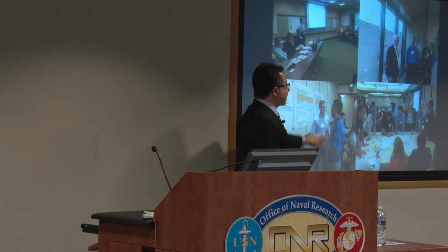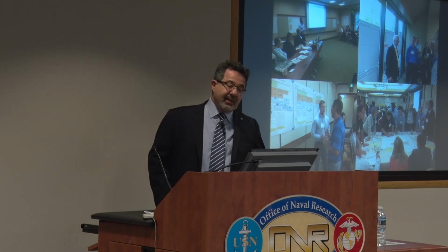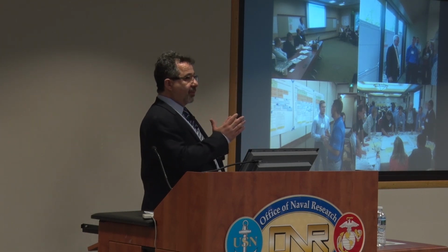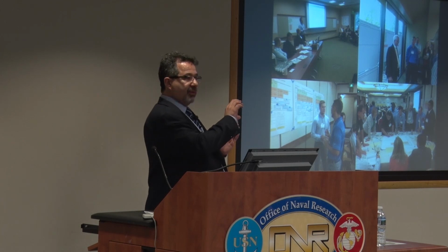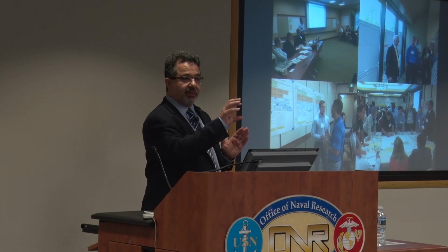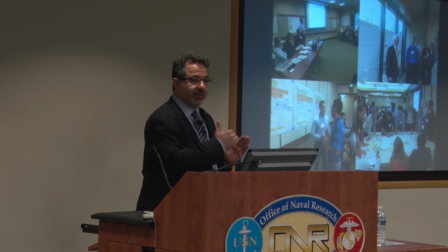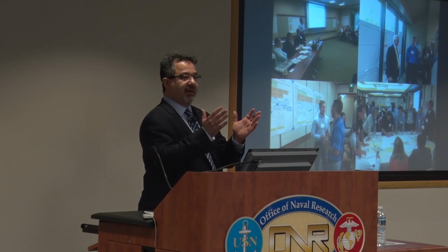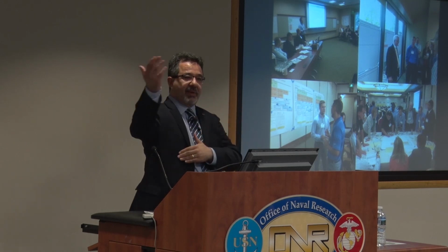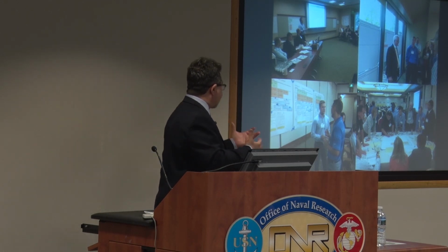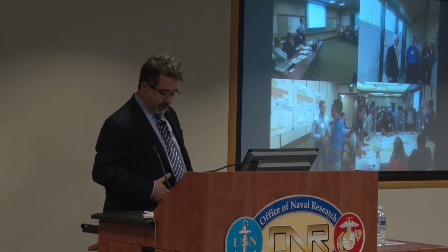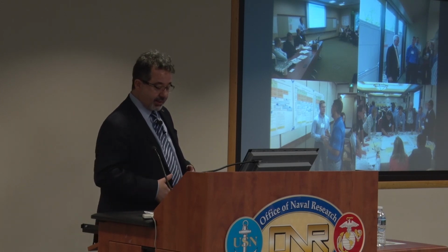Now, this was another tool that was, I think, very useful. We made the group write an abstract of the R&D program and the research questions, so that when a scientist sees that, it's basically a short proposal that they can expand into. And in that way, we were able to translate the challenge that was defined at the executive level.